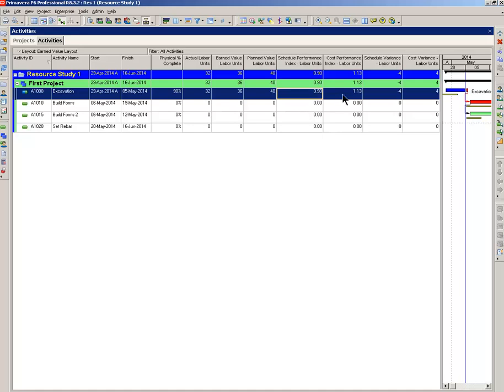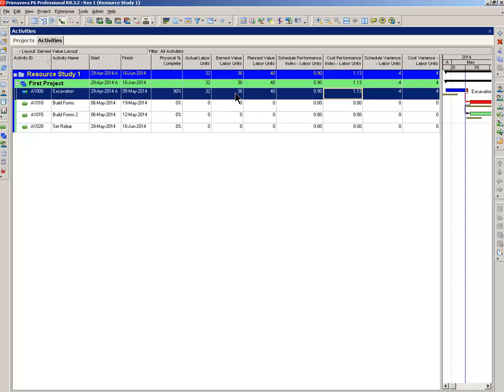Going to the cost. Now this tells us if we're spending our man hours, or if we were looking at dollars, if we're spending wisely. Now this is 1.13. Again, anything above one is good. So we're spending wisely. The method of calculating this, you take the earned value, 36 divided by the actual, 32, and that will give you 1.13. So we're definitely getting plenty of bang for the buck.